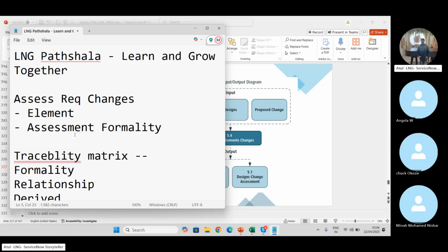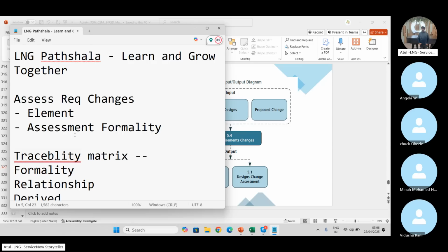If the process says a new change should come at least 2 weeks in advance, or within 2 weeks of the sign-off, only then can we consider it for the next discussions. If the change comes after 2 weeks, simply reject it, because the governance process does not allow us to do this.